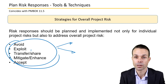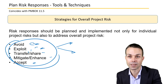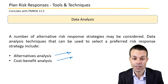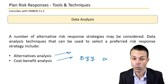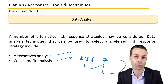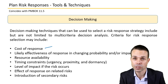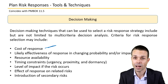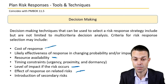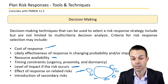Strategies for overall project risk include all of those threats and opportunities approaches: avoiding, accepting, exploiting, sharing, enhancing, transferring, or mitigating the project risk. Data analysis may be needed to look at alternatives and cost-benefit analysis — does the risk response cost a lot and give little benefit, or cost little and give large benefit? Decision making factors include cost of the response, likely effectiveness, resource availability, level of impact, effect of the response on related risks, and the introduction of secondary risks.